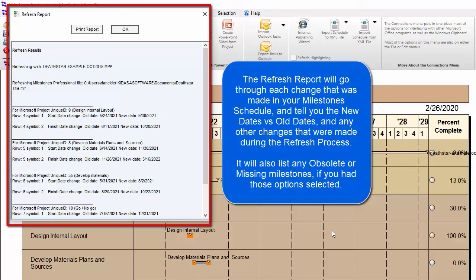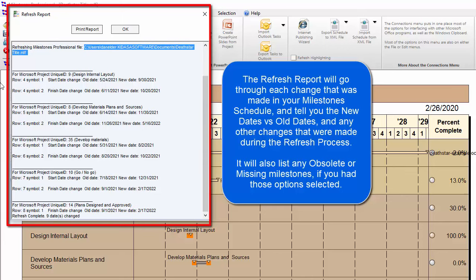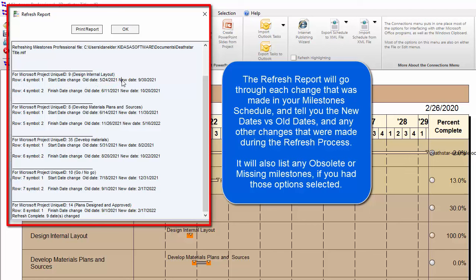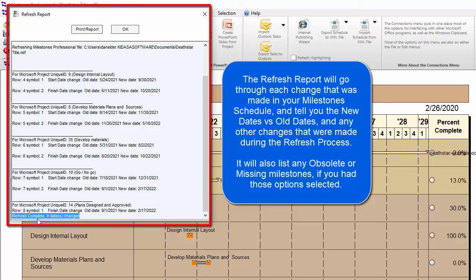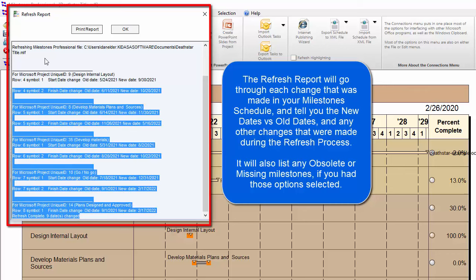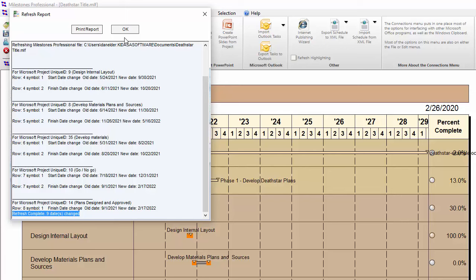At this point, press Refresh. It goes through a process and then gives you the Refresh Report. The report tells you which MPP file is being used and which Milestones Professional file is being updated, then lists each symbol that changed. For instance, Unique ID nine — Design Internal Layout — shows the old date of 5/24 and the new date of 9/30, since we moved that task out. It goes through all the different Unique IDs and name fields for every changed task. At the end it says Refresh Complete — nine dates changed. You can press OK, or copy it to a file or print it.